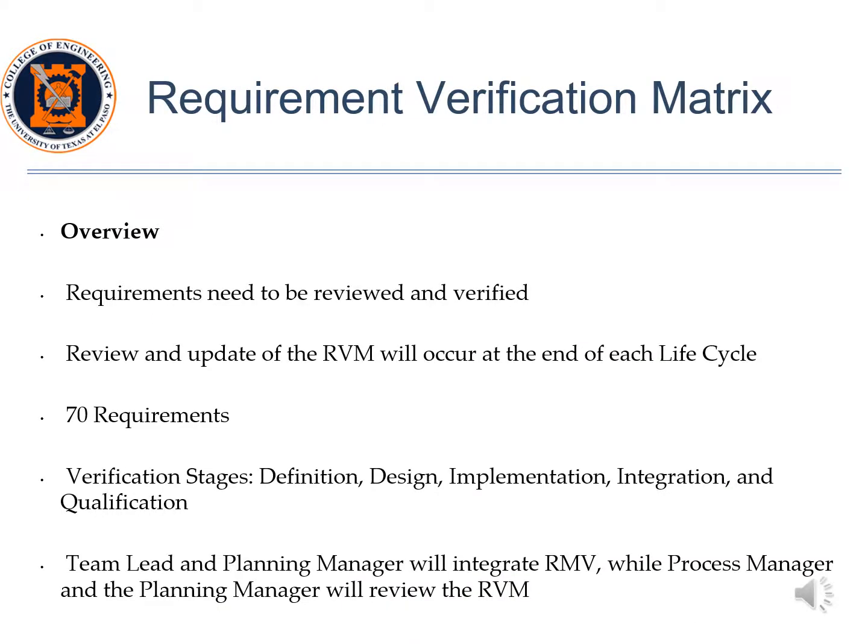Now, let's describe the requirement verification matrix. Requirements need to be reviewed and verified following a set of defined techniques. These reviews and updates of the RVM will occur at the end of each lifecycle phase. Our current RVM consists of 70 requirements.